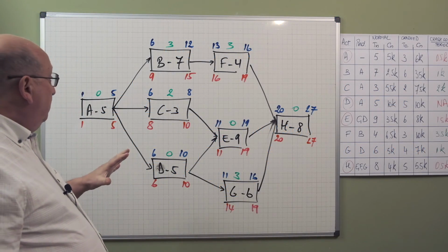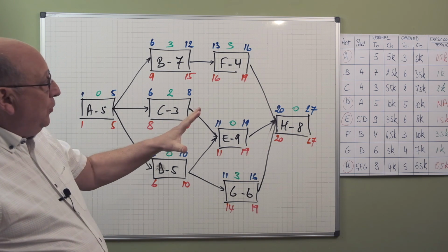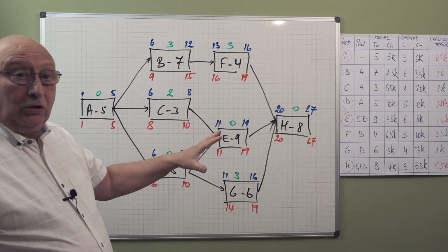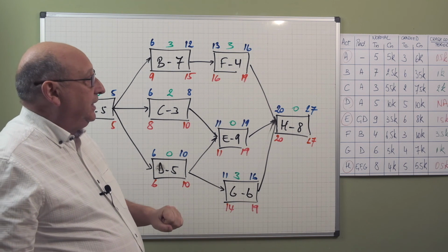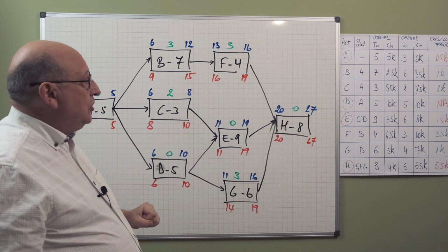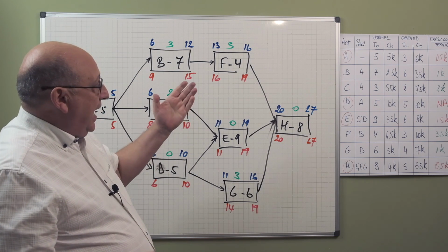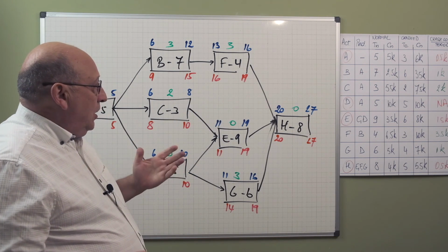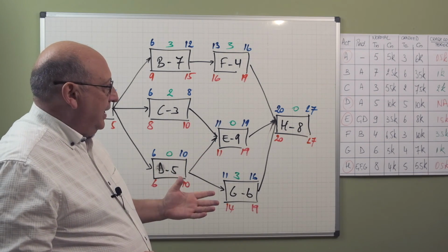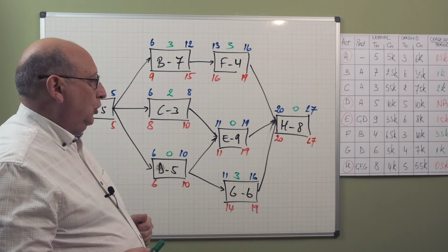We finished the precedence diagram like we did in one of the videos before, and now we have the completed overview of the activities, their normal cost, their crash cost, and the crash cost per period. And we see that the critical path is A, D, E, H, which also means that I only have to consider for the first crashing step A, D, E, and H. D cannot be crashed, so we have to make the choice between A, E, and H, and we see that both A and H are the cheapest ones to crash.